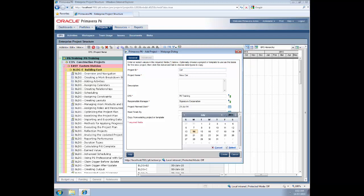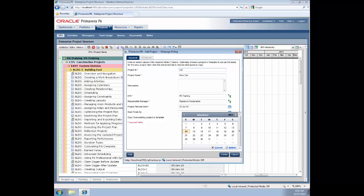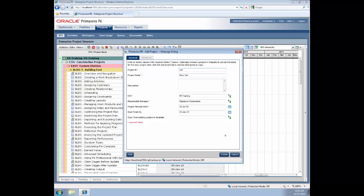So counting six months from July gives us the 23rd of January 2015. We're not going to be copying from an existing project or template, so we'll ignore that one. And now we come to the create button - hit that.